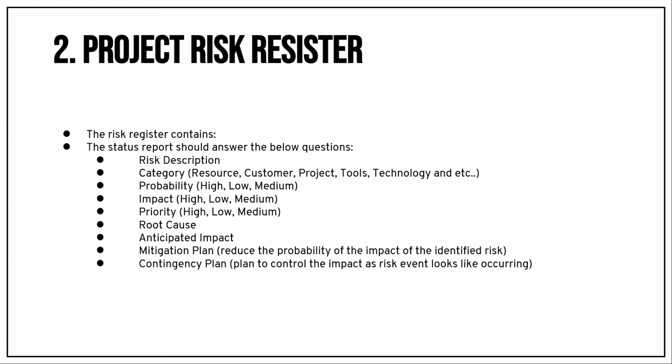At that time we need to create a contingency plan to control the impact of the risk. We need to come up with an alternative solution, have a meeting with the team, and inform our top management to talk to the third party team and give importance to this, because this may impact the release.